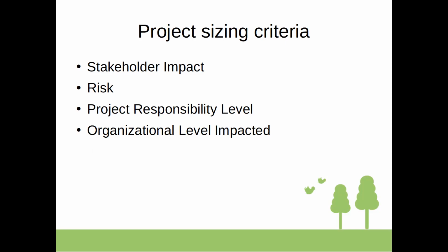That's an interesting point. Yeah, it still doesn't mean that there isn't any cost or budget being spent. There is, it's just a hidden, implied budget. Even though there is salary being paid, these people are spending time on this project, and time is money within any business. So it's still a resource for this task.